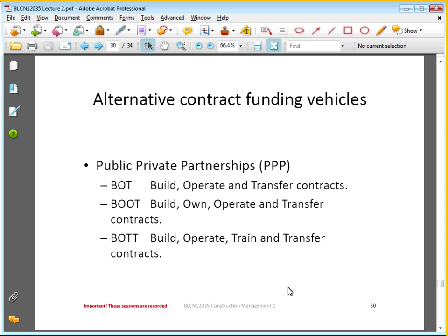If we think of a toll road, for instance, let's say the deal goes for 20 years. After the 20 years, the infrastructure has to be handed back to the government. The government then takes ownership of that, and the private company basically got 20 years' worth of benefit out of it in terms of the toll fees. Remember that they obviously have to maintain the infrastructure and keep it going.